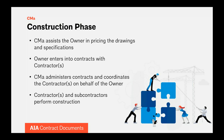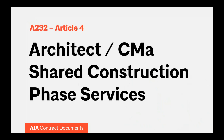Once construction begins, the CMA provides the same management and coordination of contractors that a general contractor would for their subcontractors in a traditional bid or CMC project. The owner still awards and holds all of the direct owner construction contracts. The CMA has a daily presence at the project site and becomes an additional set of eyes and ears on the work for both the owner and architect, augmenting architect services. The CMA and architect share a number of roles and responsibilities during construction.